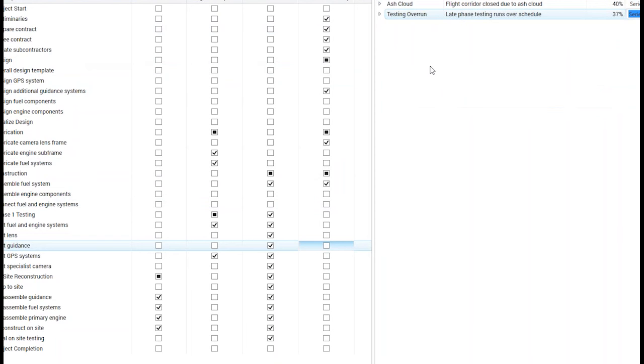What this allows us to do is, if we have a very large risk that is going to overshadow all the other risks, we can make all the risks impact in parallel, and then it will only take the impact of the largest risk. Otherwise, if we have smaller risks, we typically create those in a series style, so their impacts are cumulative.